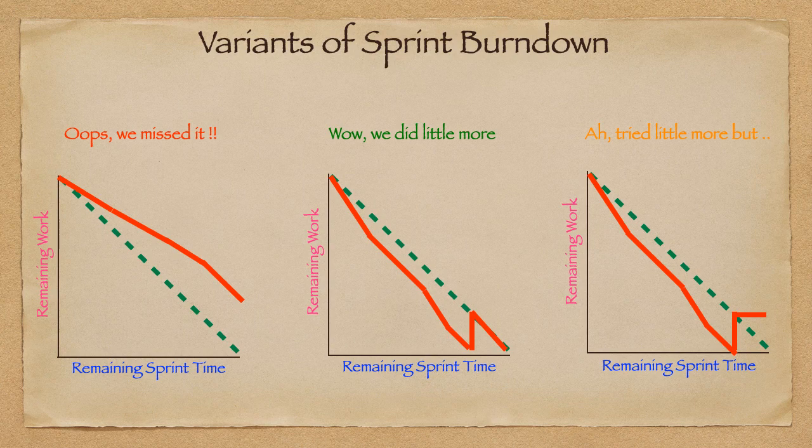And why are we not tracking based on the effort hours? That also has a problem. The problem is every day in the development team, they spend some time on the project. So they log 6 to 8 hours into tools like Jira. So typically the burn down, as and when somebody completes 8 hours or 6 hours, the burn down comes down. But by looking at the burn down based on effort hours, you cannot know how much work is completed. That is why tracking based on the number of hours or effort hours is also not a good idea.